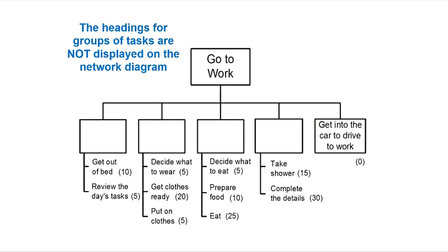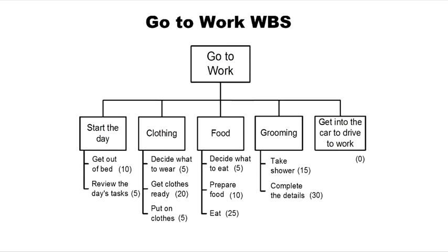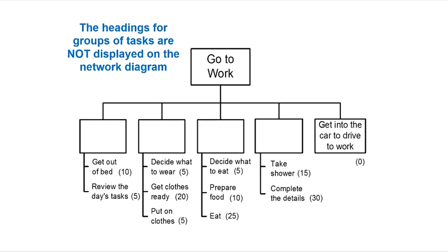We also notice that the last heading out there, get into the car to drive to work, well, that one doesn't go away. Why? There are no subtasks underneath there. The WBS does not need to be broken down into the same level of detail across the entire WBS. So it might go 2 levels deep, some might go 9 levels deep. Doesn't make any difference. Whatever you need to do on that part of the WBS is what you do.